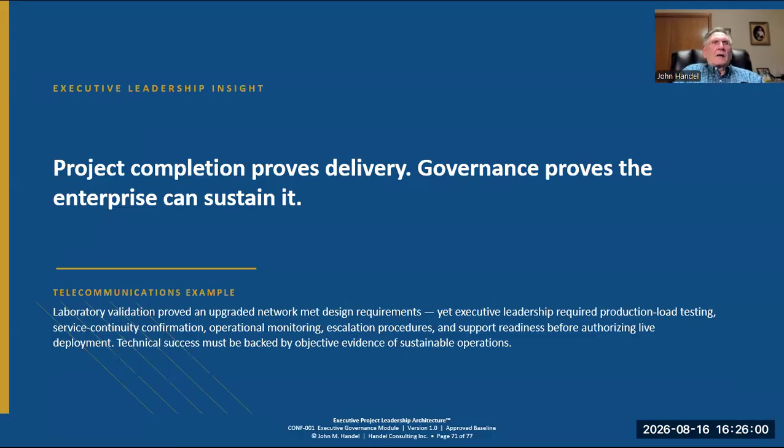Laboratory validation proved an upgraded network met design requirements, yet executive leadership required production load testing, service continuity confirmation, operational monitoring, escalation procedures, and support readiness before authorizing live deployment. Technical success must be backed by objective evidence of sustainable operations.